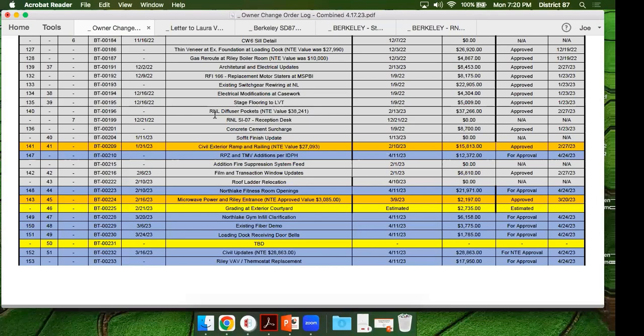So we had the infill for the door figured. We didn't have the infill for the canopy. So the removal of the steel and infill for that canopy area is just to make sure it's all one similar wall type. We're looking at an additional cost of $6,158.